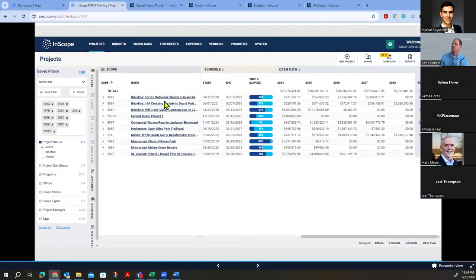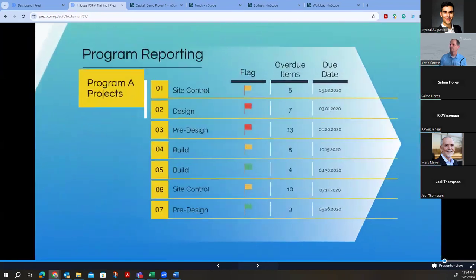If you're tying your dollars to not just what work is being done, but when the work is being done, then you'll be able to get this data as well. You can get the cost data of every project. I could go to the budget screen and show the same thing, budget data for every dollar in the year in which those dollars will be consumed. That's the type of reporting relationship that you want to be able to get to quickly.